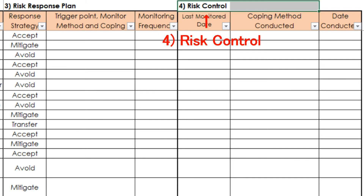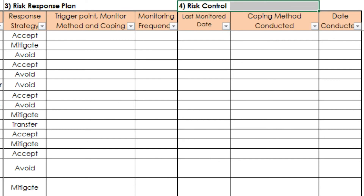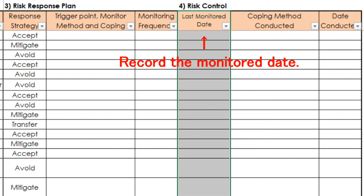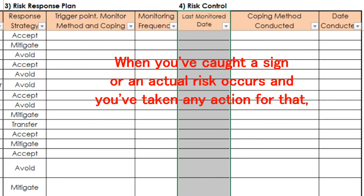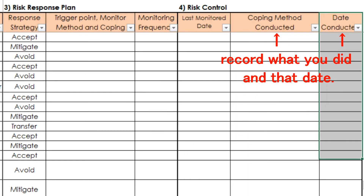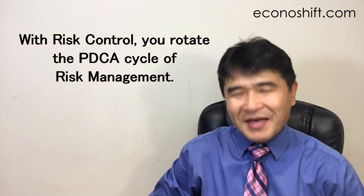The next columns are for risk control. While conducting main project tasks, monitor each risk according to each one's frequency. When you've finished each monitoring, record the monitoring date in the last monitoring date column. With this date and the frequency, you can figure out when the next monitoring date should be. When you've caught a sign or an actual risk occurs and you've taken any action for that, record what you did and that date. With risk control, you rotate the PDCA cycle of risk management.